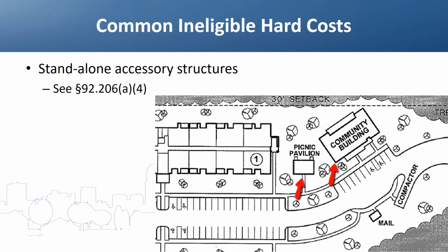When these types of common areas, like a laundry room or community room, are in a structure that includes residential units, then those construction costs are eligible. It's only when they're in a freestanding structure without residential space that we have to exclude them. I would also note here briefly that home can only pay for non-luxury housing. So for example, the program doesn't pay for the cost of swimming pools. And to the degree that market rate units are being provided with various premium upgrades compared to the affordable units, the cost of those upgrades need to be identified and broken out separately.